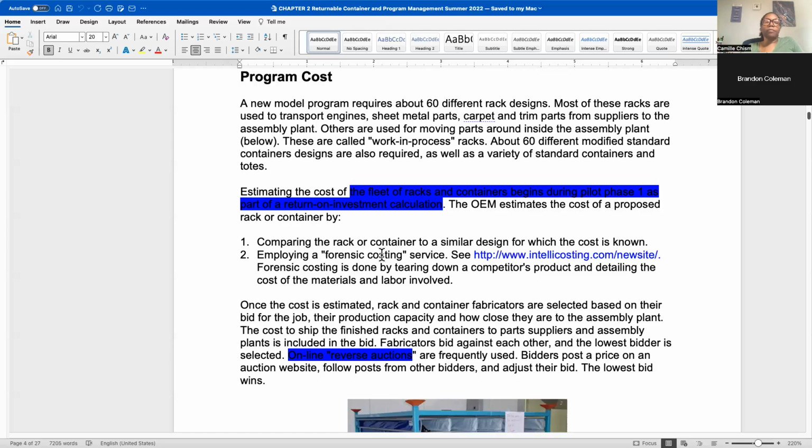We've had a lot of price increases during the pandemic. With injection molded parts, we're still having issues with getting resin and oil. So the price of this may have gone up. When you had the one program before the pandemic, this tote maybe cost, I'm just going to make up a number, $100 per tote.